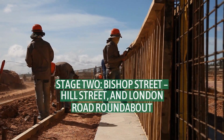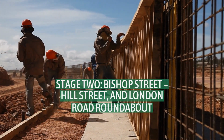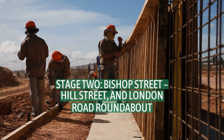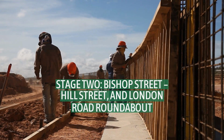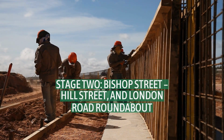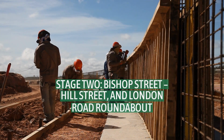The Minister of Transport upheld the landowners' appeal, agreeing with them that much of the land was not required for the road. The plans therefore had to be altered. Construction of the roundabout necessitated the destruction of most houses in Paradise Street, and its residents moved out in early 1960. It opened to traffic in December 1960, with peripheral work and finishing continuing for a further few months.